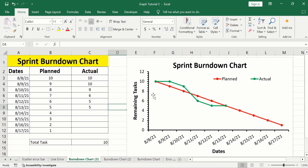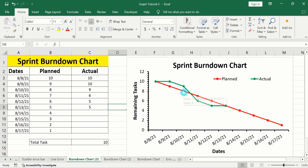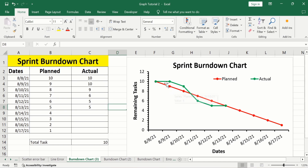If you look at this graph, the x-axis shows the time and the y-axis shows the remaining tasks value. There are two lines in the burndown chart. The red one shows the planned work or the ideal trend, and the green one shows the actual work done.